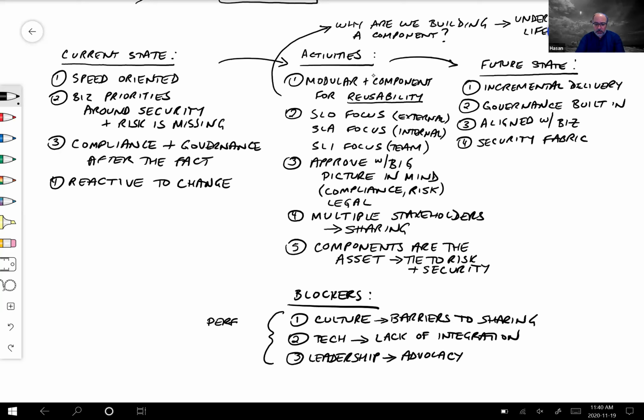When we look at the goals and objectives, we have to build the right metrics that we would like to monitor ourselves by for the next phase, really getting the baseline first. Then, in the second phase, use a Pathfinder project or Pathfinder group, based on the assessments, and implement it on a small scale, because you cannot change an organization in one day.